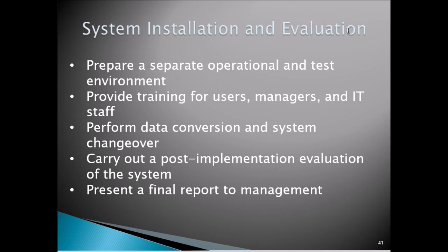System installation and evaluation. Prepare a separate operational and test environment. I've actually seen up to 4 environments. There's the sandbox or the development environment. Then you would have the test environment. Then you would have a user acceptance testing or UAT environment. And then you'd have your production environment. So I've seen as many as 4 and I've seen as few as 2, but you always want to have a test environment at least.